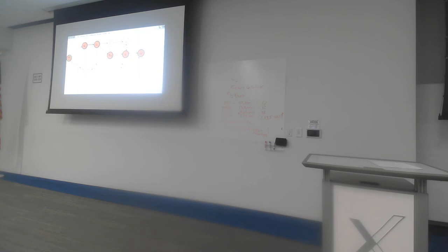And here's where the importance of the critical path raises its head again. This shows you how important the critical path is as a project manager. The critical path is the one that dictates how long the overall project will take. So if I were to crash G, all that would happen is that I would get more slack around activity G. The overall project duration wouldn't change. So it's not an option for me as a project manager, because I won't get my bonus if I crash G the way that it is at the moment.